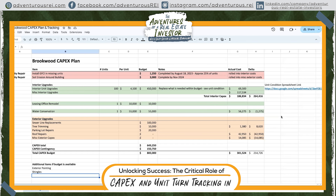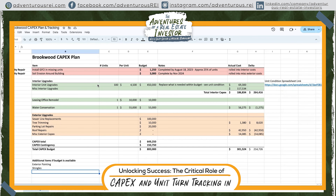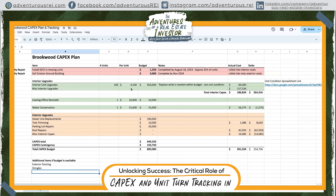I'm going to share my screen. On screen is one of our properties — Brookwood 186 CapEx plan in a Google Sheet. I have all of the CapEx items planned in our business plan listed. There are priority repairs that came directly from the lender — this is an agency loan — which must be completed within a certain amount of time, such as installing GFCI outlets and addressing soil erosion. Then I have interior upgrades and exterior upgrades broken out, plus a total and our contingency. This particular budget is $800,000 for a 100-unit property, spending about $4,500 per unit as we turn them.